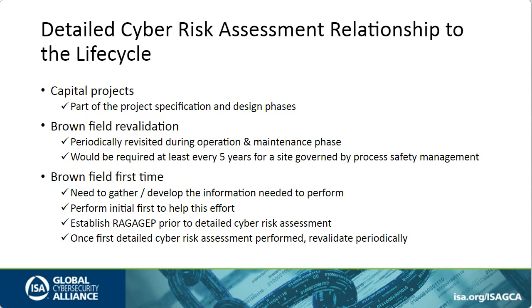In those cases, what you need to do is first gather your information, develop the information necessary to perform the various risk assessments that should be done, performing the initial risk assessment first because that's the least amount of information you need. That can help the effort get started.